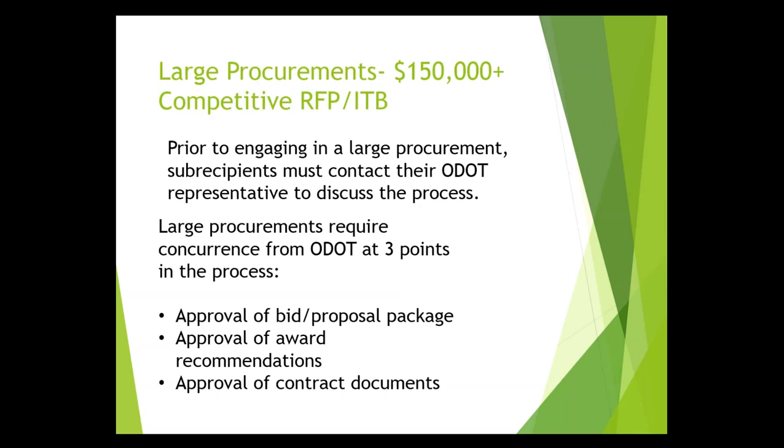The large procurements of $150,000 plus, again, are going to be more rare. We're really going to spend more time with micro and small purchases. For large procurements, first of all, before you engage in a large procurement, you must contact your ODOT representative to discuss the process. Large procurements require concurrence from ODOT at three points in the process.